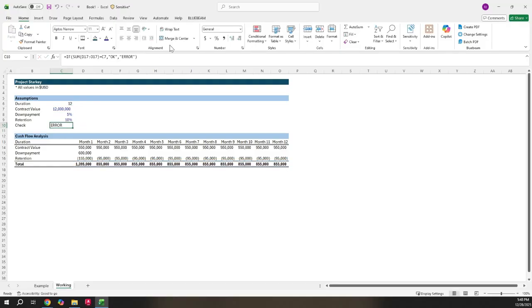So I mentioned before that I intentionally made a mistake. And if you've had a few minutes to try to guess what it is, this month 12, the way that retention works is that we're withheld whatever the retention amount is until the project is over. And so ideally in this perfect scenario that we're creating, that would be month 12. And so we actually want to get paid that money back.